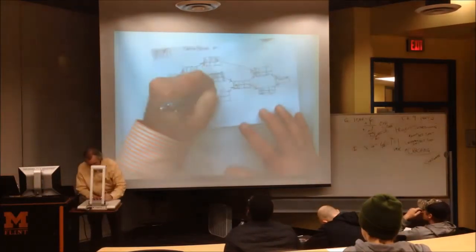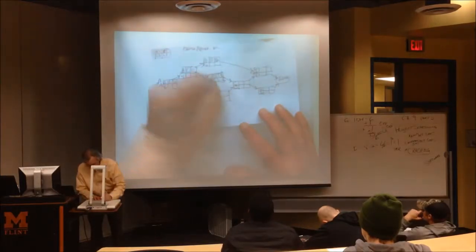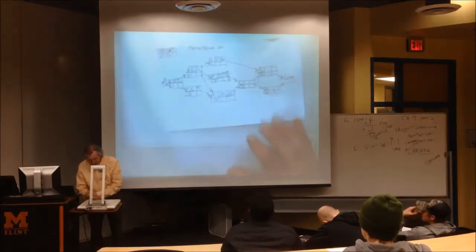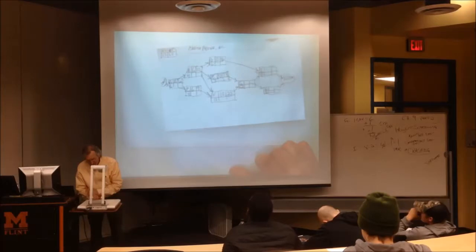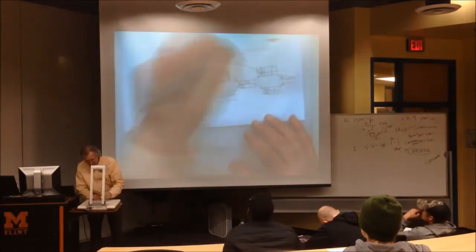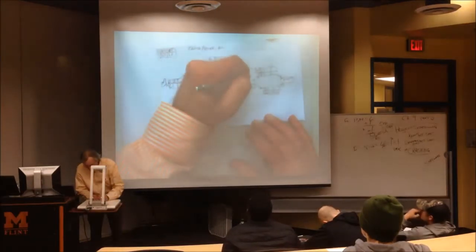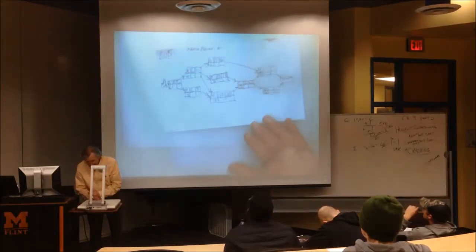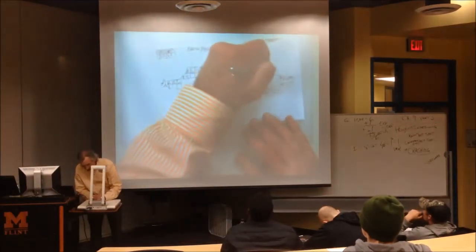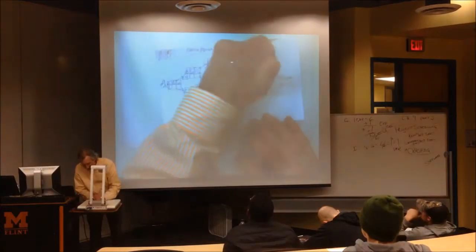I forgot. When does it finish? The earliest finish? 20. Wow. G could start as early as 20. Very good. Just like that. You had 13 and 20 to choose from. Went with 20. Could finish as early as 22. I could start as early as, that's right, 16 or 22. We go with the 22. Add 8. We're at 30.